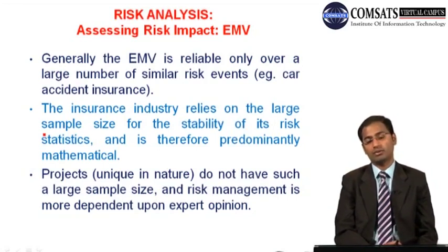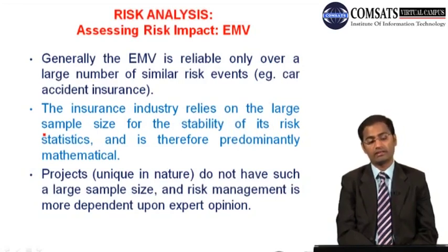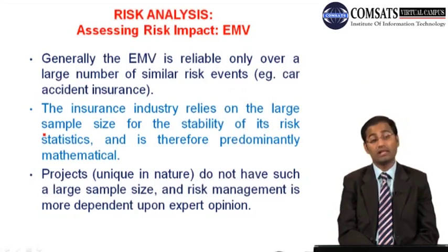Assessment of risk impact through expected monetary value. Generally, the expected monetary value is reliable only over a large number of similar risk events, for example, car accident insurance. So the insurance industry relies on the large sample size for the stability of its risk statistics and is therefore predominantly mathematical. Projects unique in nature, remember, do not have such a large sample size, and risk management is more dependent upon expert opinions.